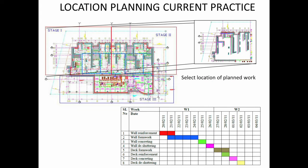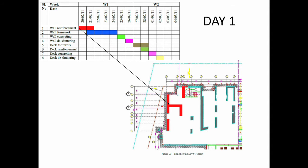Without such tools, what site planners or engineers do today is take a plan and mark week 1, week 2, a particular day, and note which location and what activity will happen. For example, wall reinforcement will happen on these two days and they mark where it is going to go, or wall formwork on all of these days. This is a very effective way, but it does not give you the help of a software tool or a very structured approach. It is very difficult to keep track of things.